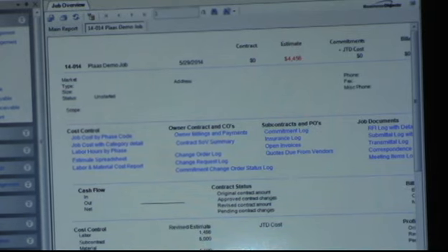So it says it would be a zero price change order because you're not affecting your contract value, and typically it would be a zero cost change order because I'm not changing my total estimate. I'm adding dollars to one line item and taking those same dollars away from a different line item. And why don't we do that since we're talking about it?